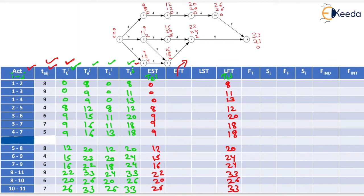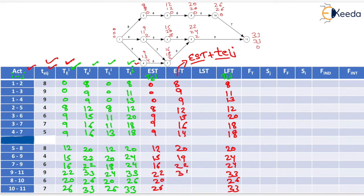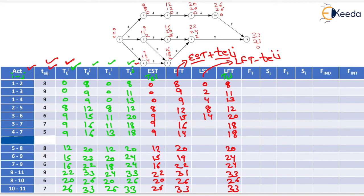Now we fill the EFT value, which equals EST plus activity time (TEIJ). The EFT values are: 8, 9, 9, 12, 15, 16, 14, 20, 19, 22, 31, 26, and 33. For LST, we subtract activity time from LFT. The LST values are: 0, 2, 4, 8, 14, 11, 13, 12, 20, 18, 24, 20, and 26.